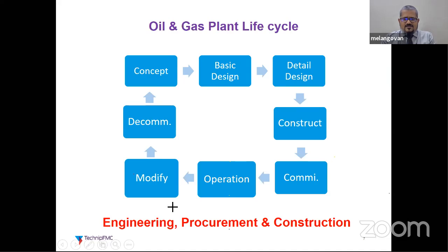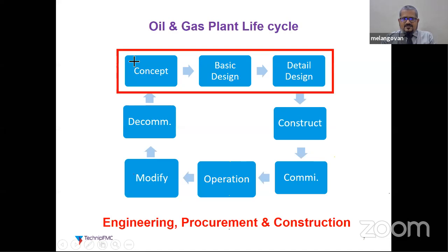In oil and gas, we call this whole thing engineering, procurement, construction, EPC. The first three phases, concept, basic design, detailed design, are called engineering, and then we go for procurement and construction. So the engineering contractor's typical work is up to these phases: concept, basic design, detailed design, and construction. Then the rest of the phases will be handled by the owner operator of the plant. So, with the title, process safety aspects in oil and gas projects, as I am from an engineering company, the whole webinar will concentrate on these three steps of the EPC project: the concept stage, basic design stage, and detailed design stage.